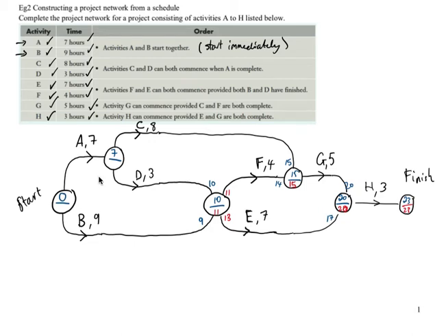Going to this node here, we've got 15 minus 8, which is 7, or 11 minus 3, which is 8. We choose the minimum, 7, and we've got a 0 there, and let's just double check, and we have a 0 to finish. See how we have got a 0, 0? It's always our sanity check. If you don't get a 0 here, something's gone wrong, so it's time to recheck your network.